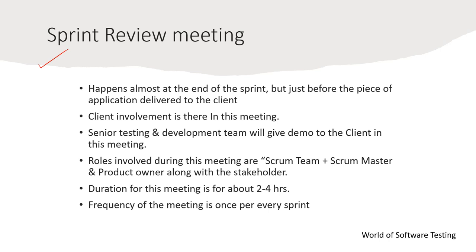Roles involved during the sprint review meeting are the scrum team, scrum master, product owner, and the stakeholder. Duration is about two to four hours and frequency is once per sprint. The scrum master is just an observer in this meeting — he does not take an active part.